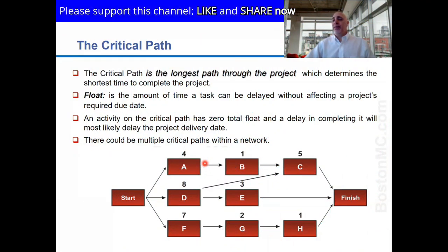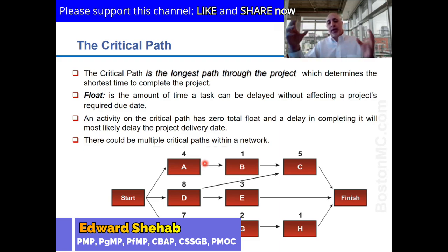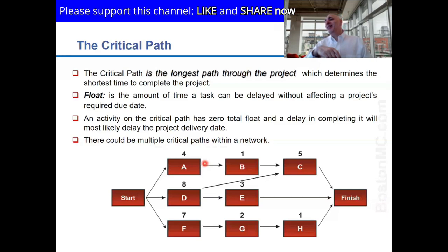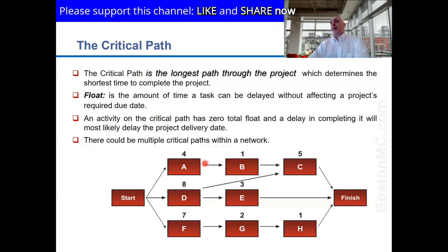The goal, once you have identified all activities, put them in order, and estimated their durations, is that you will know how long your project will take. There's something called the critical path of a project — it is the path that doesn't have any flexibility. It is critical in the sense that you cannot delay any of these activities. You can finish sooner with no problem, but you cannot delay.